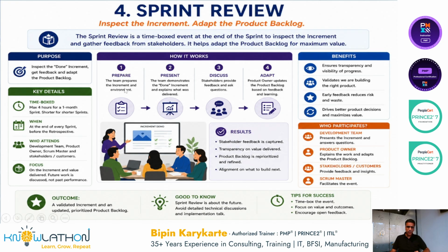How it works? Prepare the team. The team prepares the increment and environment. The team demonstrates the done increment and explains what was delivered. Discuss with the stakeholders. Stakeholders provide feedback and ask questions. Product owner updates the product backlog based on the feedback and learning. What it achieves is stakeholder feedback is captured, transparency on value delivered, product backlog is reprioritized and refined, alignment on what to build next.